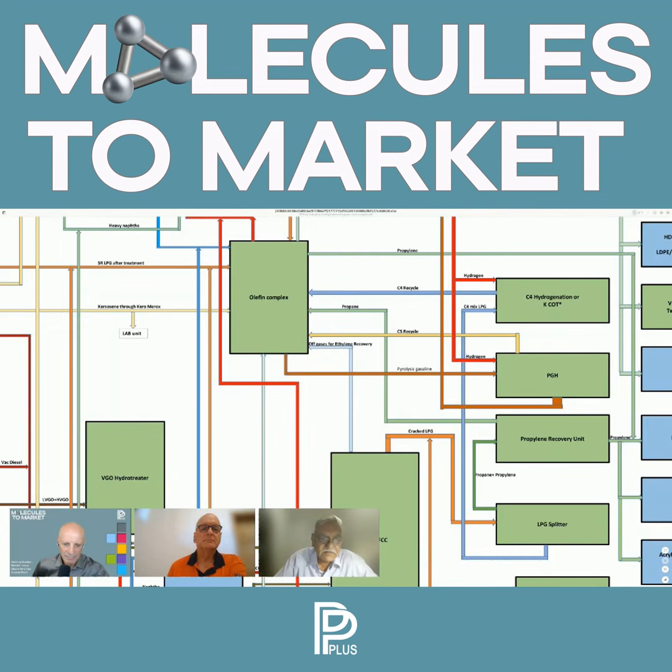Now, if I have to select a licensor, I must first of all make a tender document. I must go public. I must invite bids. I must technically and commercially evaluate them. And then carry out the NPV, net present worth of all the technologies which have come, and then select the right technology from there based on the NPV.